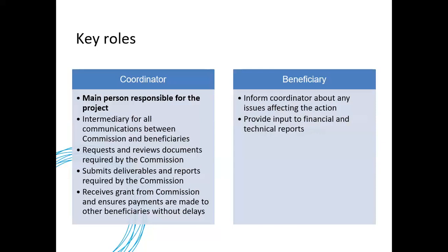Moreover, the payments of the grant agreement are made from the Commission to the coordinator. The beneficiaries do not receive the grant directly from the Commission, but they receive it from the coordinator. Of course, the coordinator is then responsible for giving out this payment to the beneficiaries without any unjustified delay.